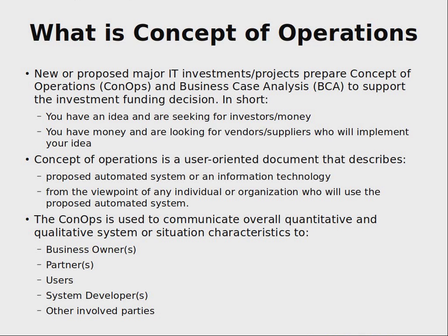So that means government and local government institutions which have some supplied budget for their activities. And as we will see in more detail later, one of the laws of project management is that if you have a fixed budget, then you usually spend the entire budget without any leftovers, and the only question is how much you can do with this budget depending on how expensive things are or whatever.